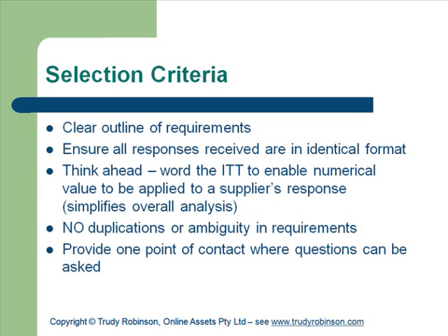The other thing is also provide one point of contact so that questions can be asked, or give the people who are going to respond some way of asking questions. And it might be that if one person asks a question, everyone else needs to know about it, so you might publish it on a website somewhere, so that the one question is responded to and everyone else can see it, so you don't have to answer the same question by all the people that are going to